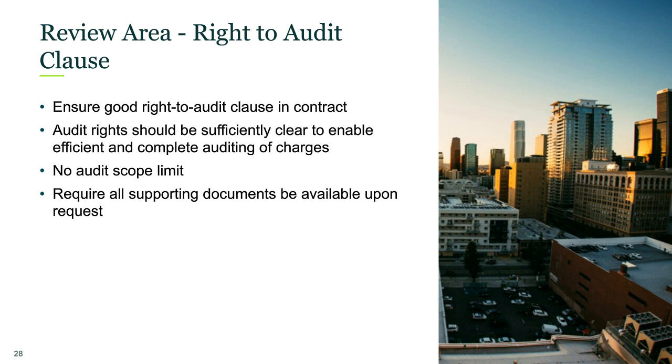If you know what's getting charged to the job, even if you don't have recovery options, if someone's pushing a change order to you, you can use the information to maybe reduce it or negotiate it off the table. You can review quality of materials, etc. So the right to audit clause is your friend.